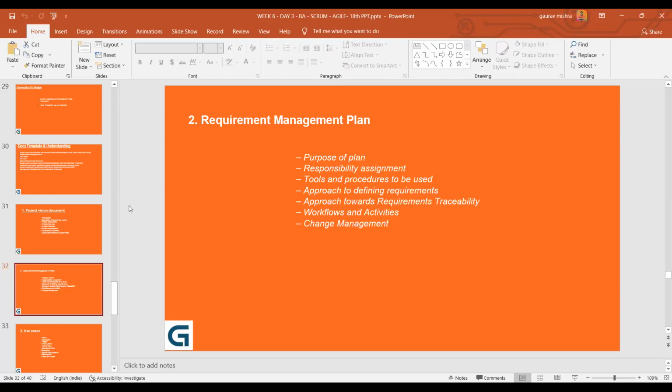Yes, CRs are just small, tiny features, new features, or modifications to existing features that are introduced and come to the project team, and we code them as a CR. So those CRs will be briefed under change management as well. Those changes will also have a life cycle, covering what phases they undergo before incorporation. So that will be covered under the change management system.